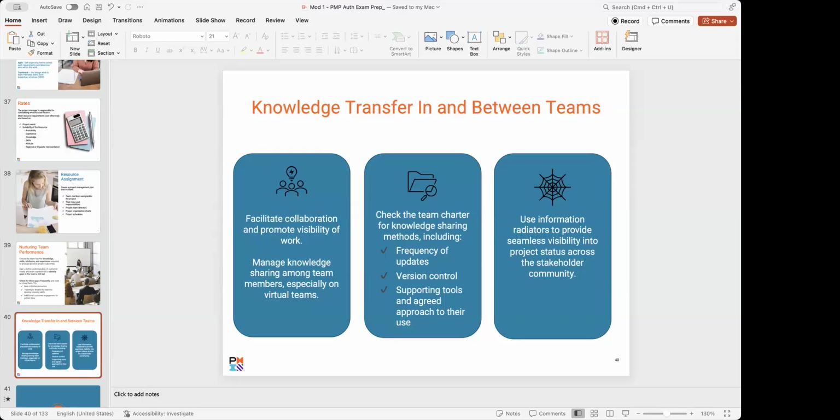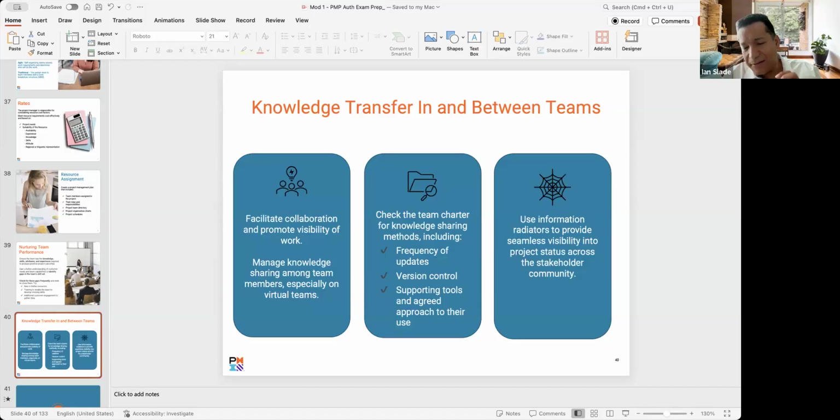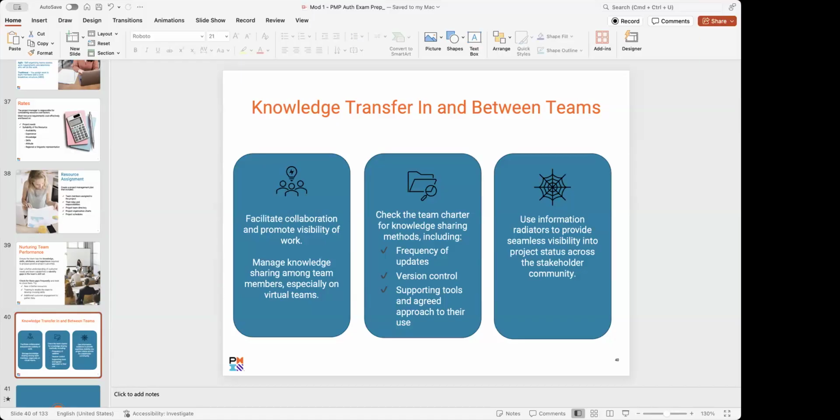And we also shared decisions that have to be made at different levels. So there are decisions that functional areas can make, and then there's a decision that has to be made by the president of the health plan, right? And so we overstepped our bounds last time in the project, so we learned quickly how to identify those types of business decisions that have to be made at a different level. So I hope that was fun. Yes. No, thank you for sharing.